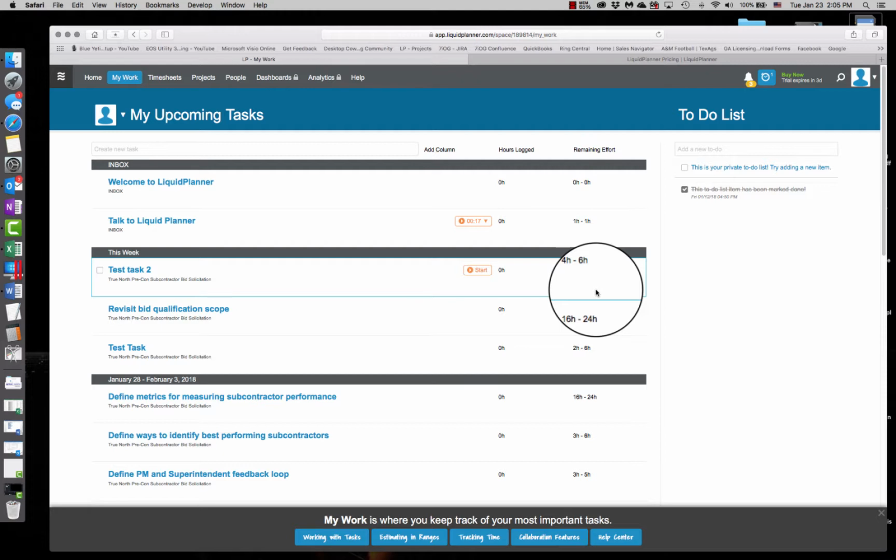their predictive scheduling engine. And what that is, in a nutshell, is if you picture an algebraic equation, all these scheduling tools work on multiple variables. You have to know the activity duration, either a start and finish date. You have to know the amount of time, if you're doing resource management, it's going to take to perform those tasks in those number of days. You have to know the resource name, right? And you have to track. You have to enter percent complete or progress in hours as the work is completed in order for the schedule to have any value. The prioritization in most Gantt charts or CPM type schedules is managed through relationships between tasks.